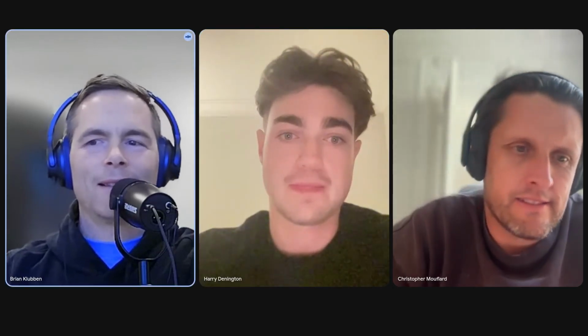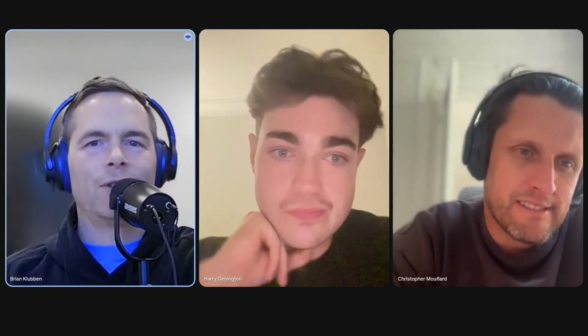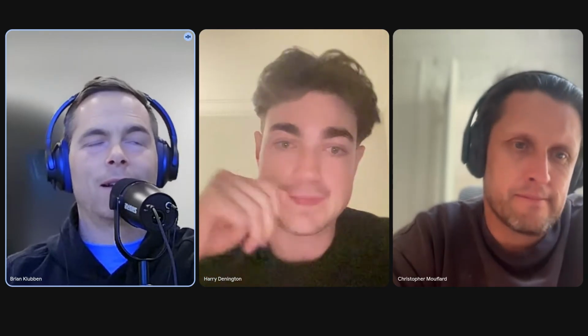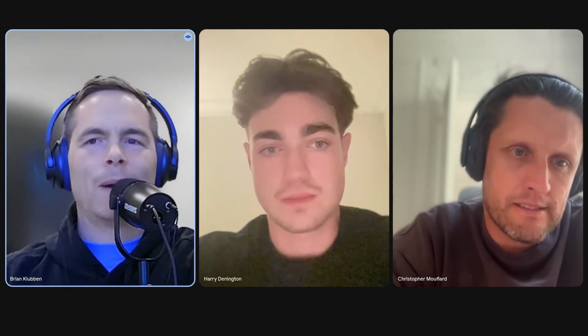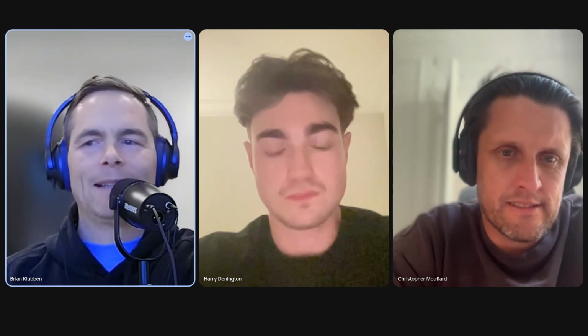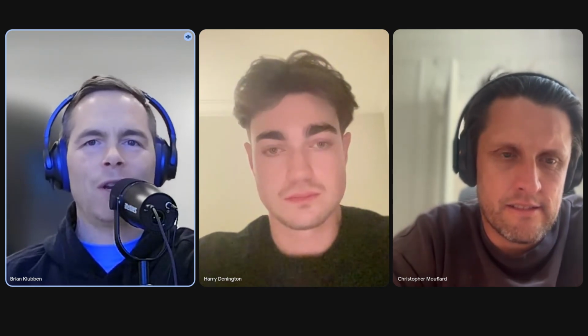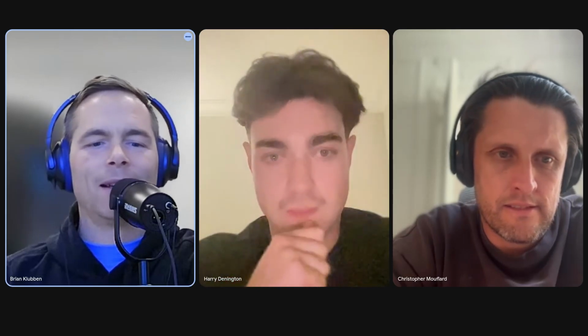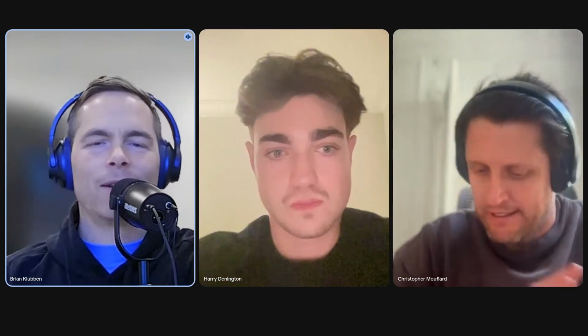You're not wrong, Harry. I hate spelling mistakes, but ultimately they don't really change the outcome of a project. I think it just deteriorates the confidence in the drawings, if you will. But yeah, dimensions by far are way more important, because you're right. How many times has a door been put in the wrong place, a column been put in the wrong place? That all becomes change orders, right? That all becomes extra. It all becomes waste on the job. So yeah, dimensions, that's the winner there.